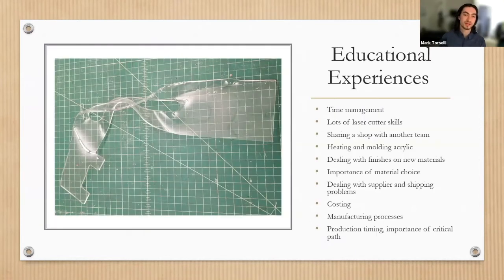So we had a lot of educational experiences throughout this process, mistakes we made, things we came across. Like David had said, time management was our number one by far. Just thinking about the critical path of how one thing is going to take a lot longer than another thing, and we should have started those things earlier, as well as accounting for drying times for finishes and glues. But besides that, there was still a lot to learn. We all got a lot of practice with the laser cutter, etching and cutting.